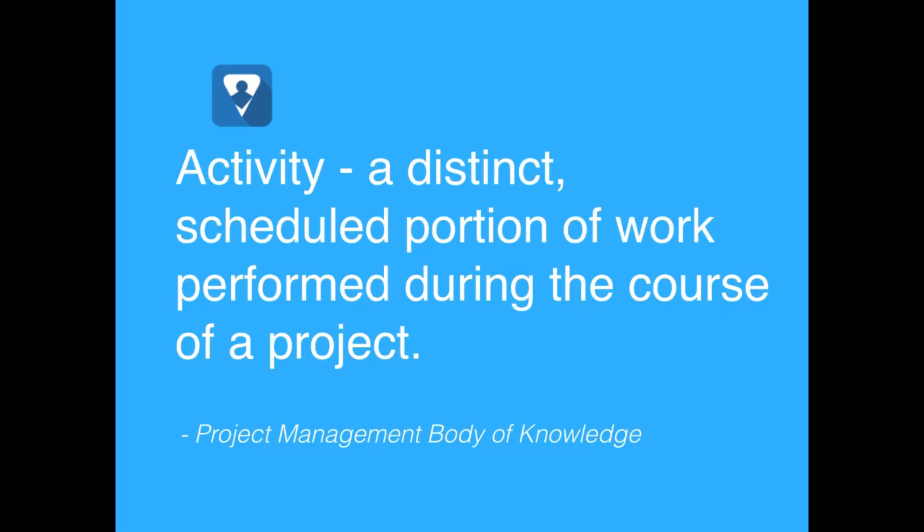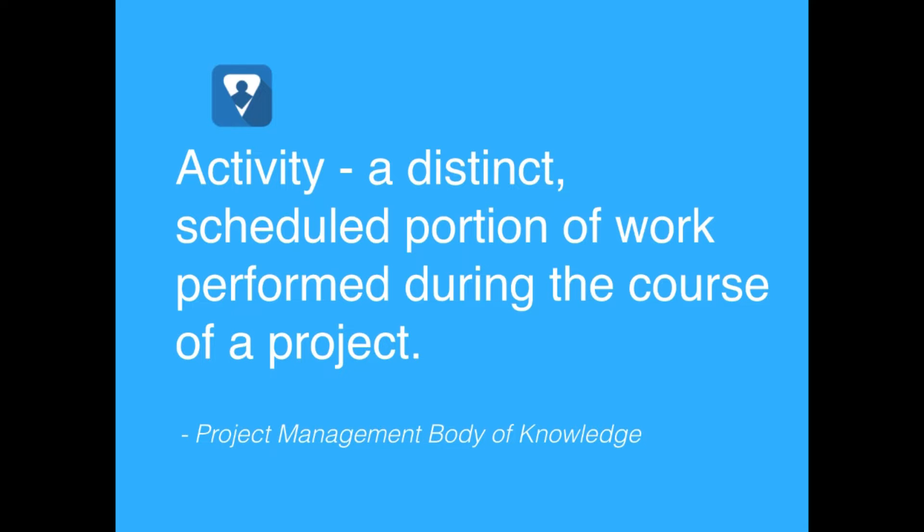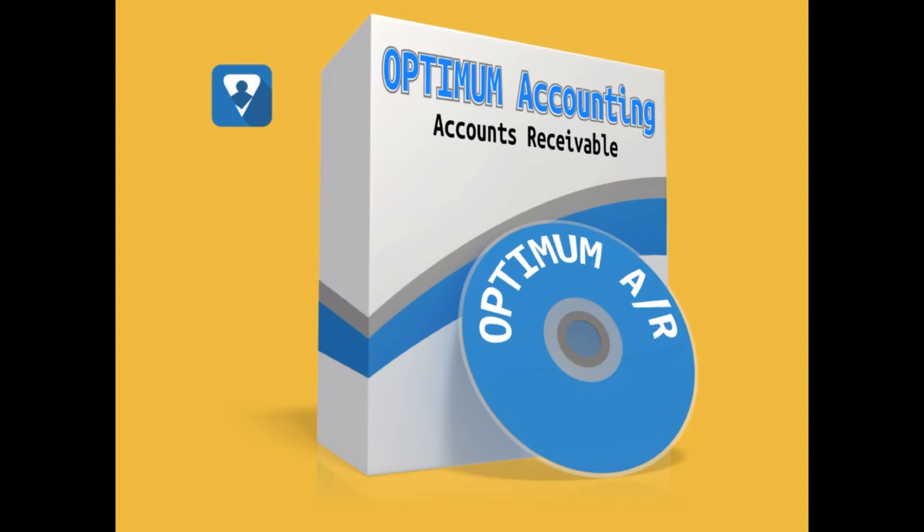Now I like to think of activities as the specific actions that we perform to create the deliverables. For example, let's say that we were creating software, which is a deliverable. We would have activities such as develop requirements, we'd have an activity to develop a design, develop test cases, we certainly have an activity to complete the coding.